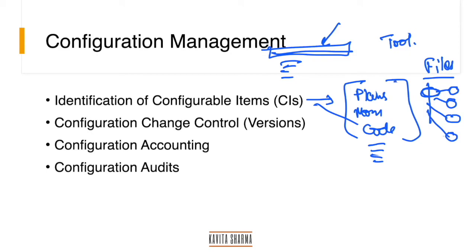In case you have any other tool, we do that using a tool. So we find out what are those configurable items, we find out what is the tool which we're gonna use. We also write down that we are writing all of this right now in configuration management plan. We also write down what is the naming convention of files. Why are naming conventions important?